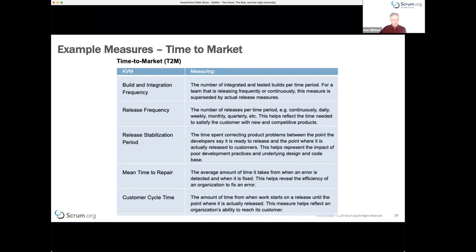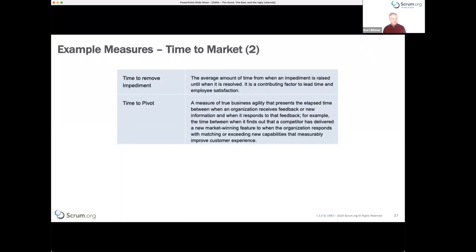On a daily basis, you might look at build integration frequency. If you're doing continuous integration, that's very rapid; if builds are only daily or weekly, your time to market is typically lower. Release frequency is also a potential indicator, though just because you have weekly releases doesn't mean your customer lead time is one week — it might still take months from idea to customers' hands. Mean time to repair is a measure of how quickly you can respond to technical changes.